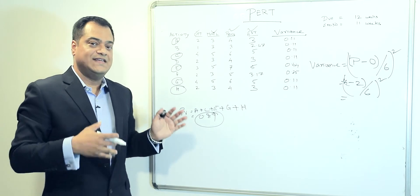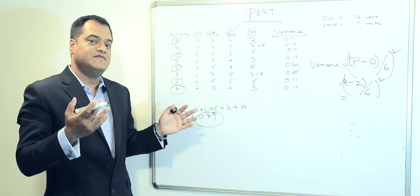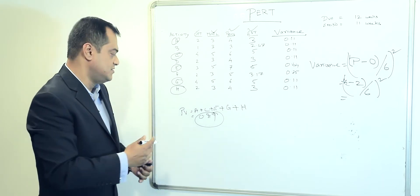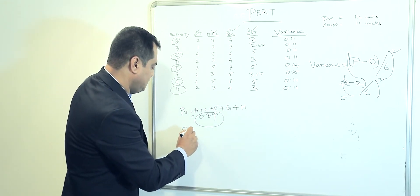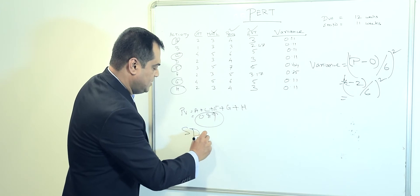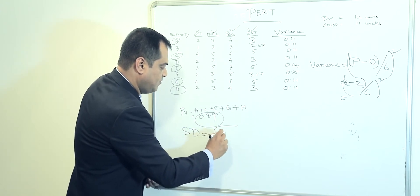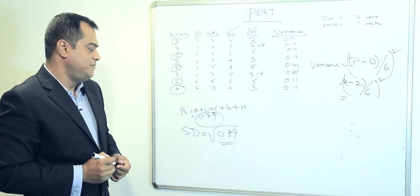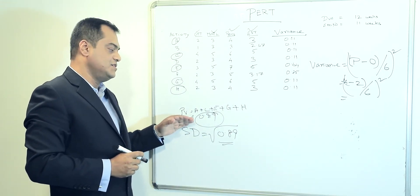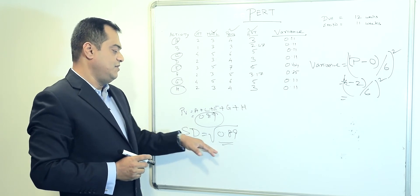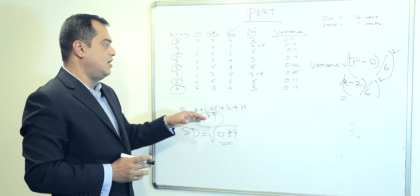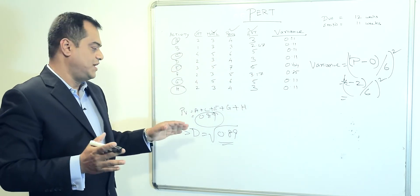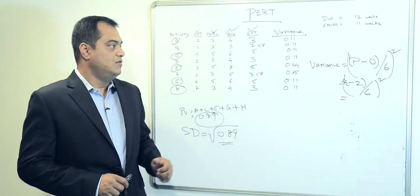Once we have the project variance, we calculate the standard deviation. The standard deviation is the square root of 0.89. This tells us the overall deviation that can be allowed in the project, looking at all the estimates and variances put together.